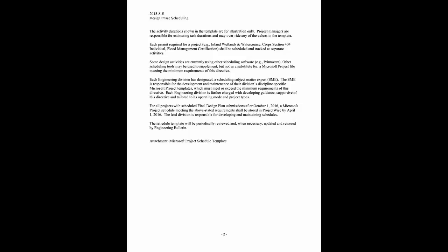Each engineering division has designated a scheduling subject matter expert, or SME. The SME is responsible for the development and maintenance of their division's discipline-specific Microsoft Project templates, which must meet or exceed the minimum requirements of this directive. Each engineering division is further charged with developing guidance supportive of this directive and tailored to its operating mode and project types.